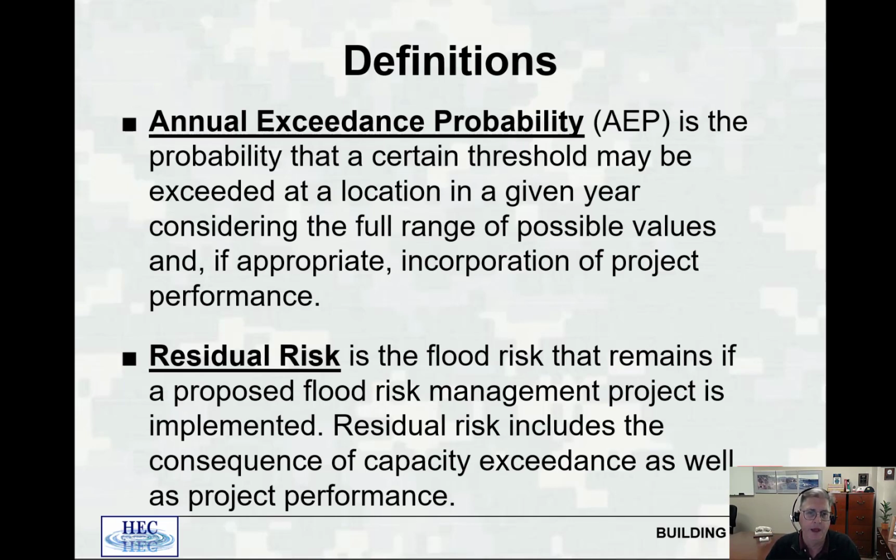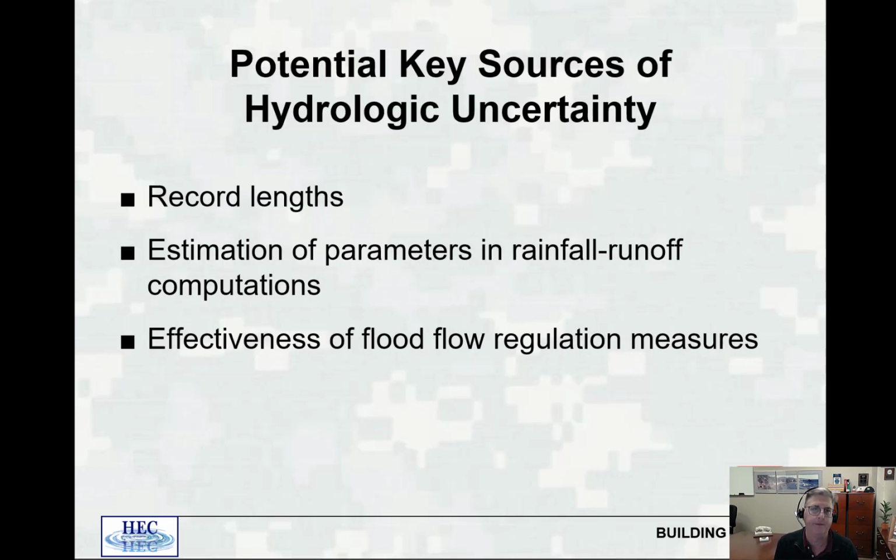Residual risk is the flood risk that remains if a proposed flood risk management project is implemented. You will still have risk even though you build a flood risk management project. So residual risk includes the consequences of capacity exceedance as well as project performance. And you will need to define what residual risk is if you build that project.